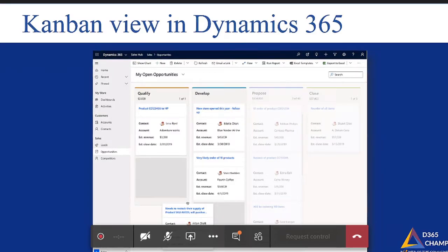Yes, and as I had mentioned, it is more about managing your workload, managing the load on your teams, managing your work in a more streamlined way. So WIP limits, or work in progress limits, is the concept which makes sense when you opt to move from grid view to Kanban view, wherein you can always keep a check on how many different activities to consider in work in progress at a certain point in time.